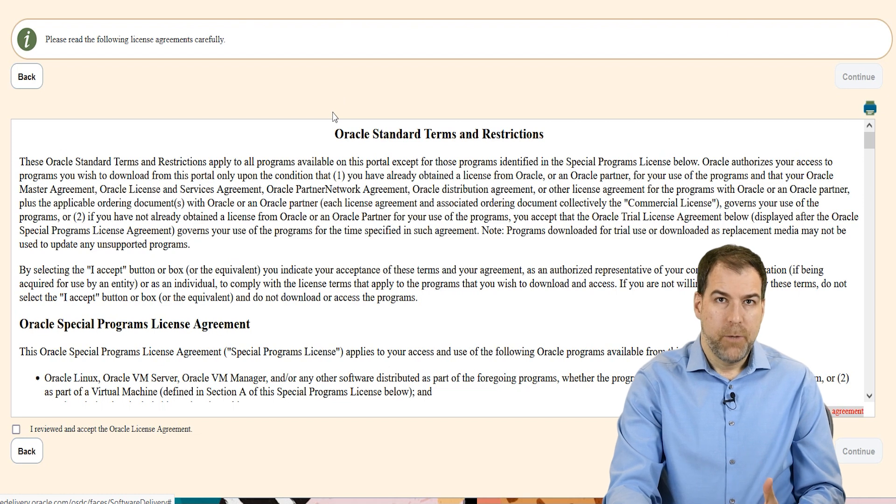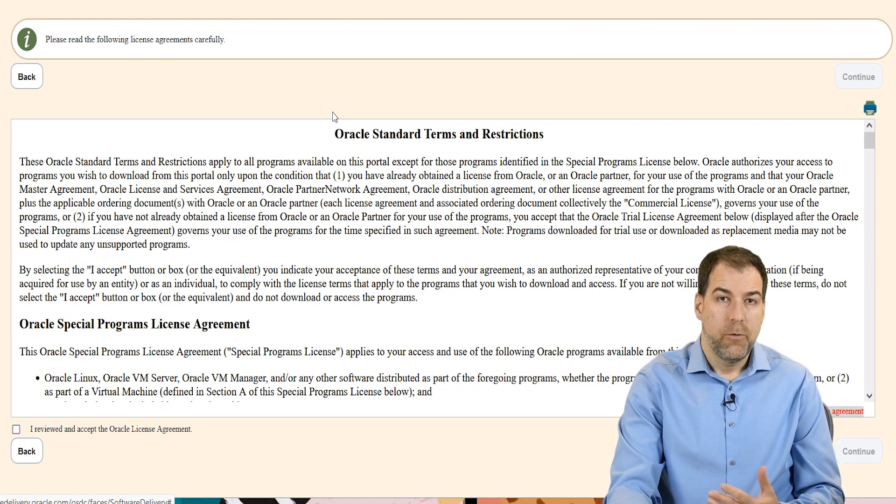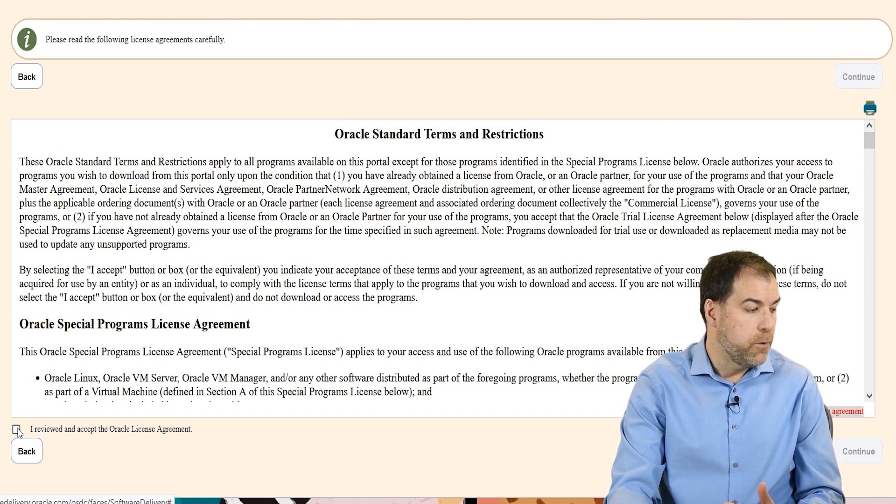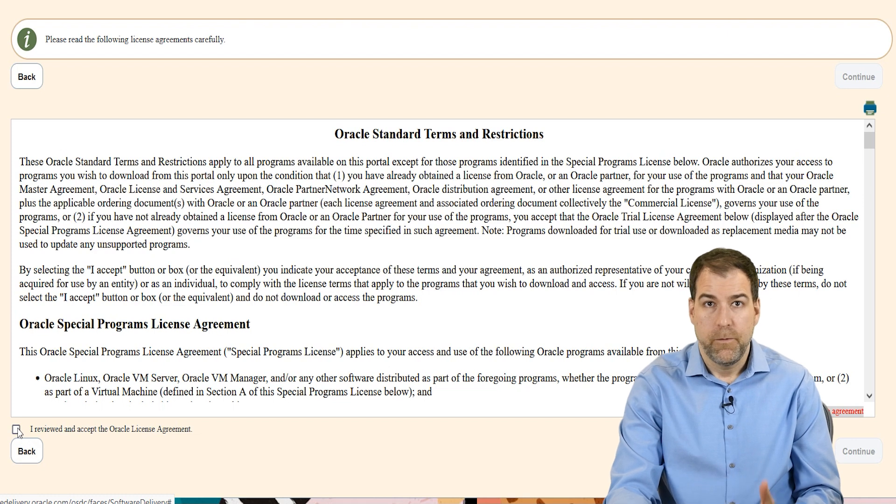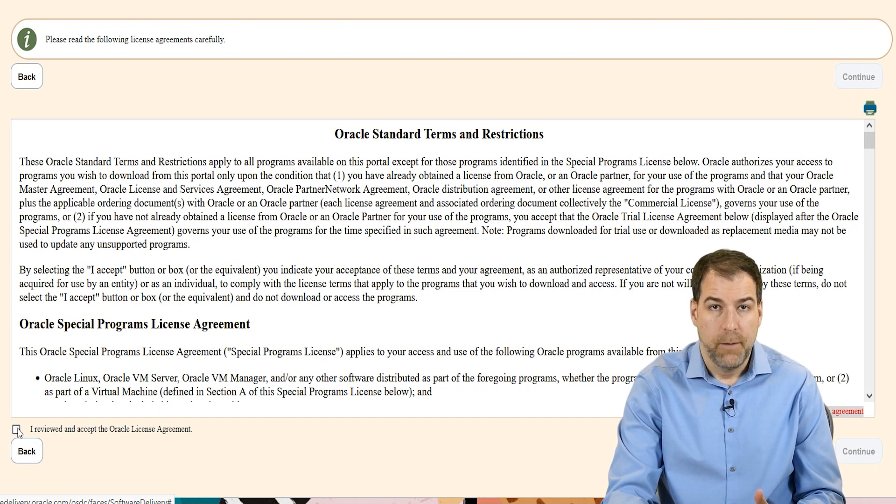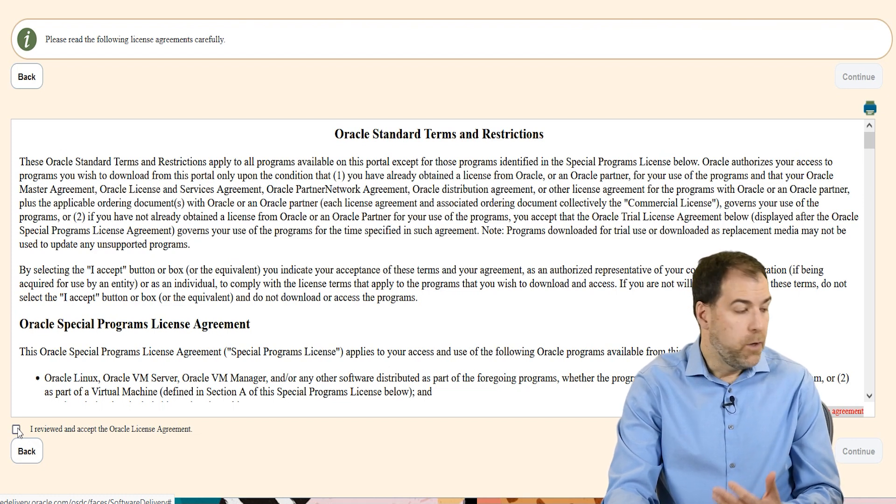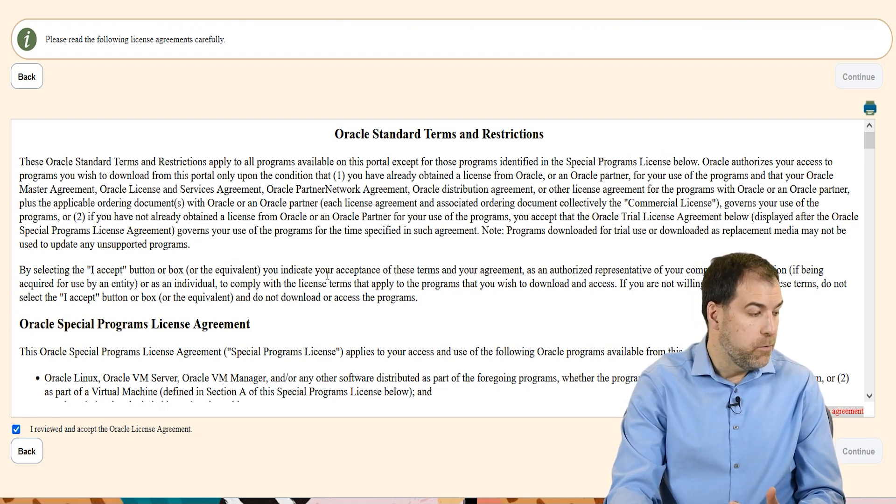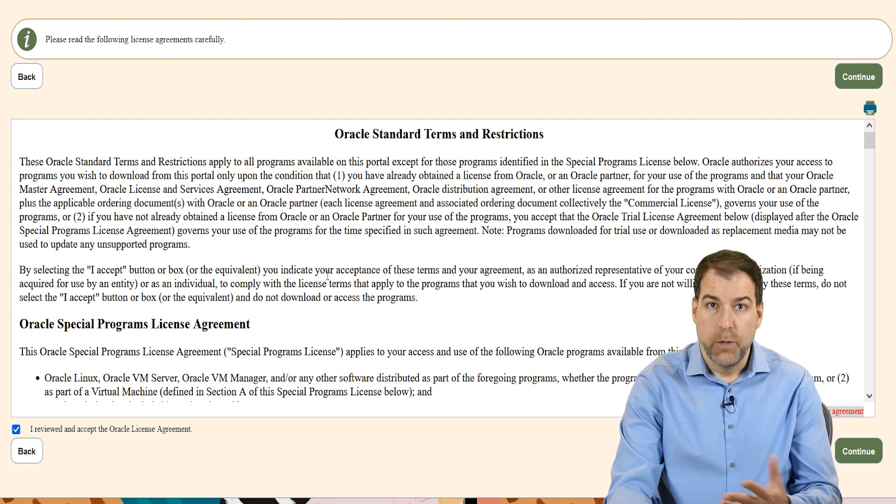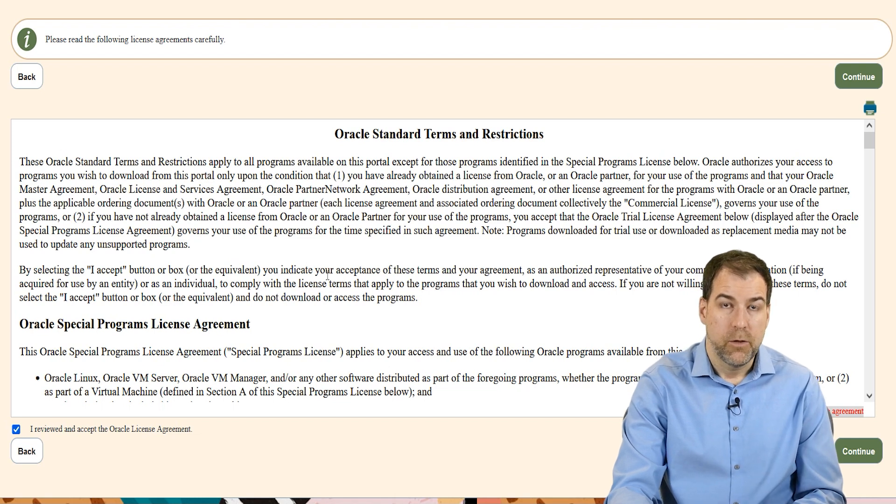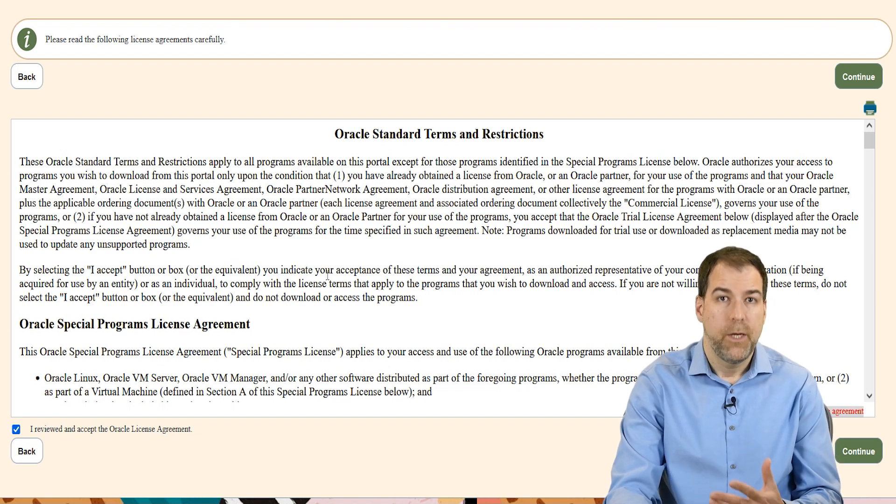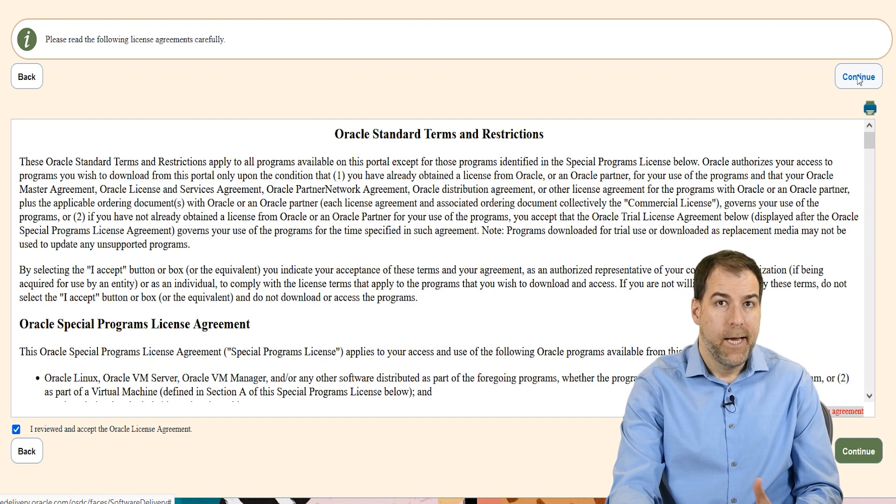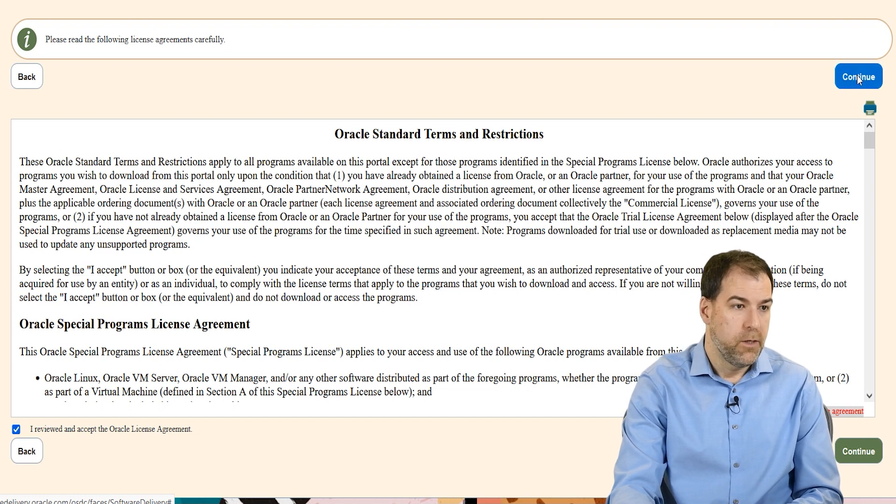Okay, so this is the package that we're looking to download. And the platform is Microsoft Windows. By the way, if you're an Apple user, I'm sorry, it doesn't work on Apple. It only works on Windows. Let's click Continue to get to the download piece. Now, this part's important, and I want to highlight that as you download the software, you're downloading a fully functioning copy. But as you agree to the terms, and I really recommend you read the terms, you are agreeing to a 30-day license of the software. Read that and then click Continue.